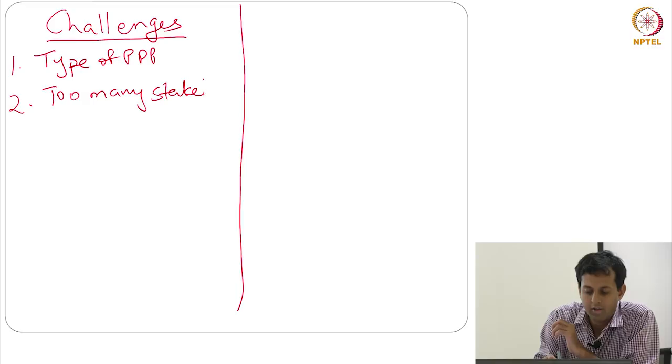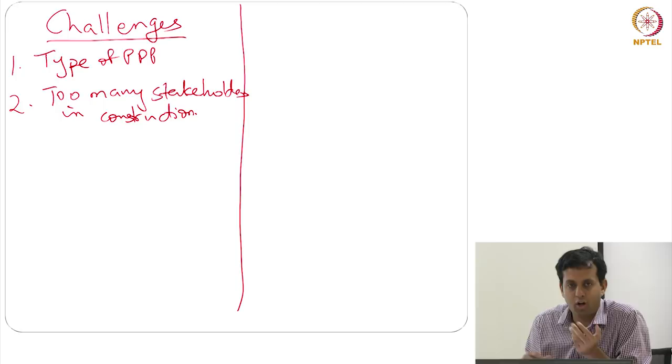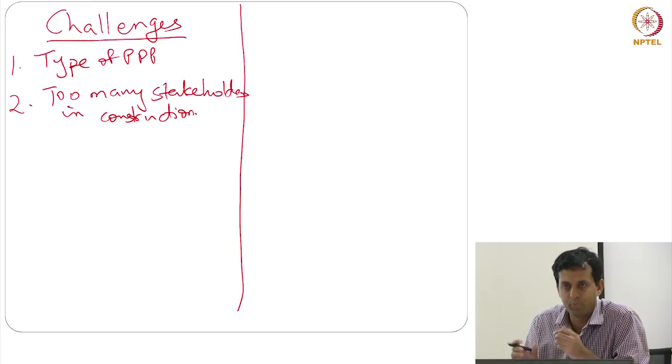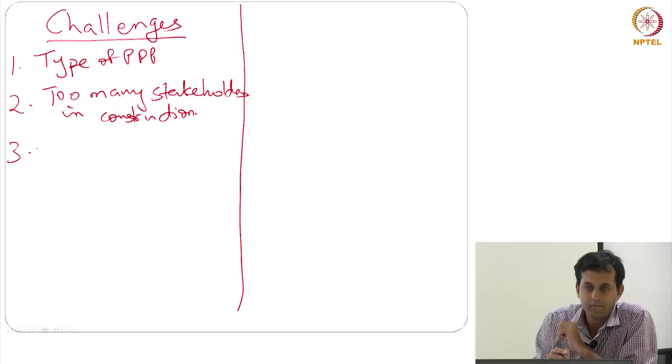Okay, and these are essentially a number of organizations that need to give permission. You know, the local municipality, maybe the electricity department, of course the contractors, the subcontractors, possibly labor unions, etc., all of these sort of groups. So that was a big challenge that needed to be negotiated. Okay, what other challenges? The bidding itself was a huge challenge.